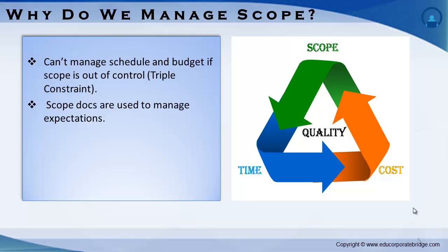During the planning phase, scope change will impact schedule and cost, as additional planning would be required, which would need more resources and extra time to make the changes to the plan. Once the project work has started, scope changes will substantially increase the cost and delay the project's schedule.